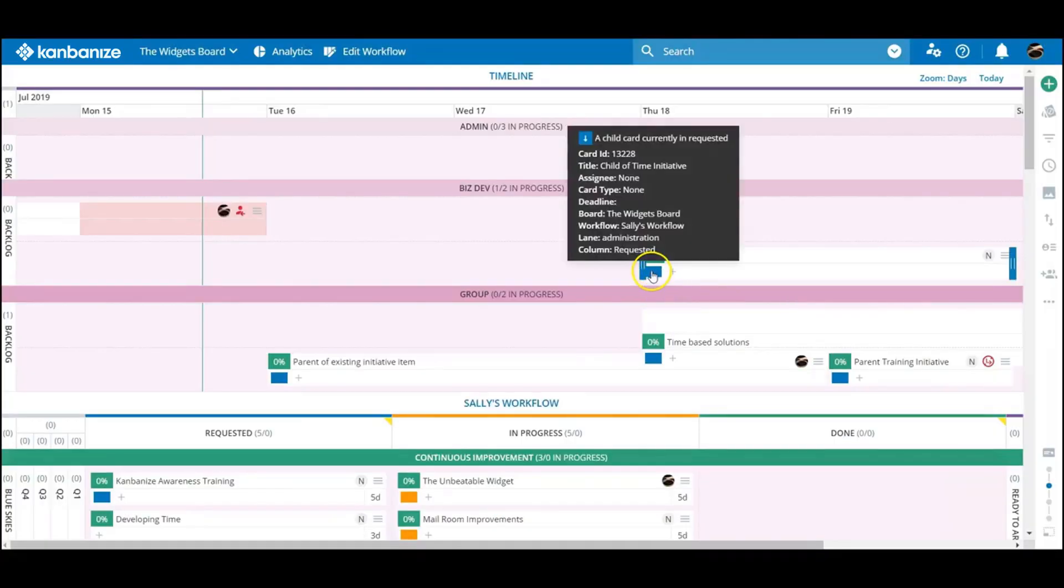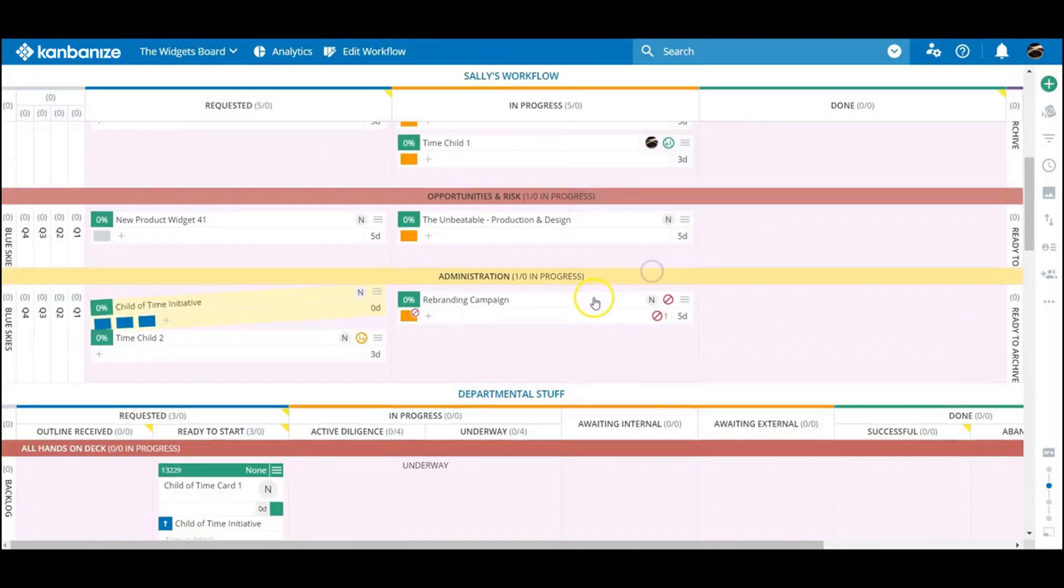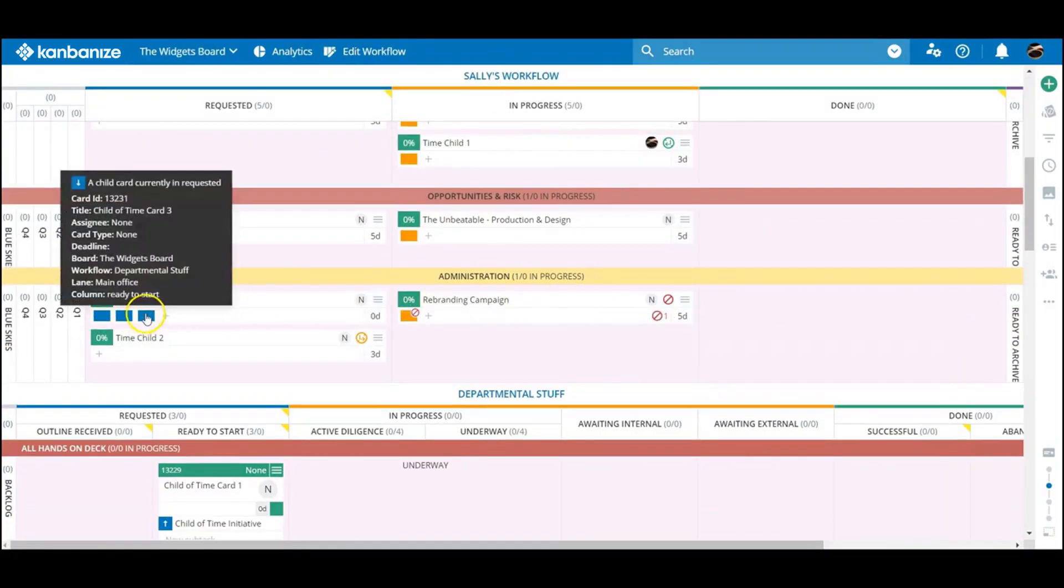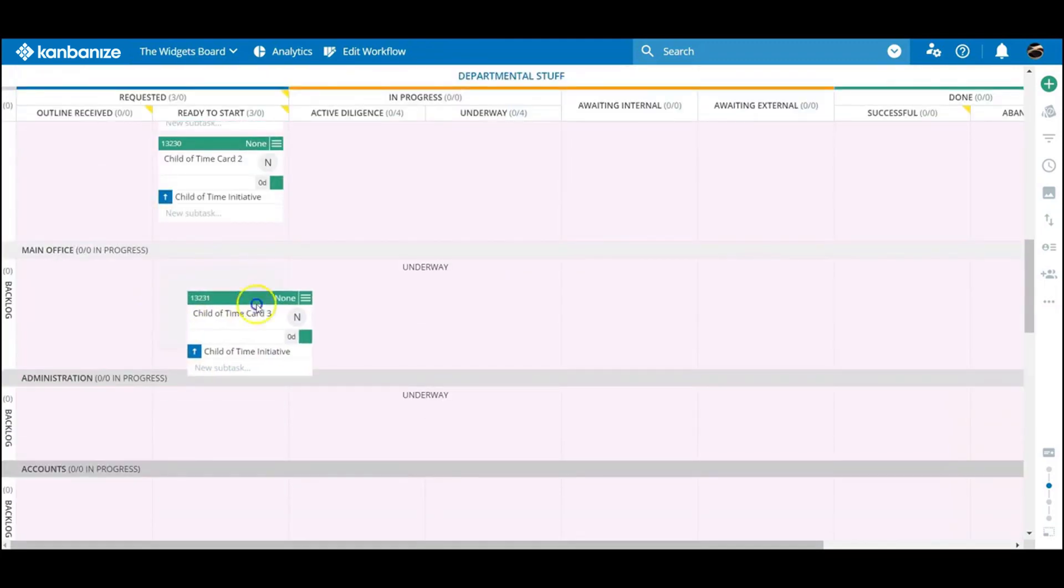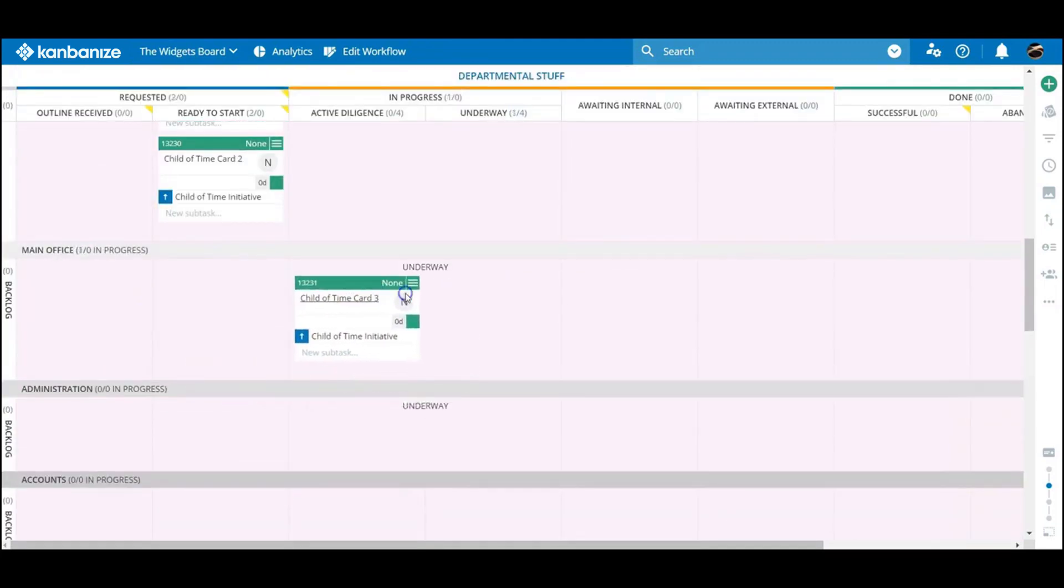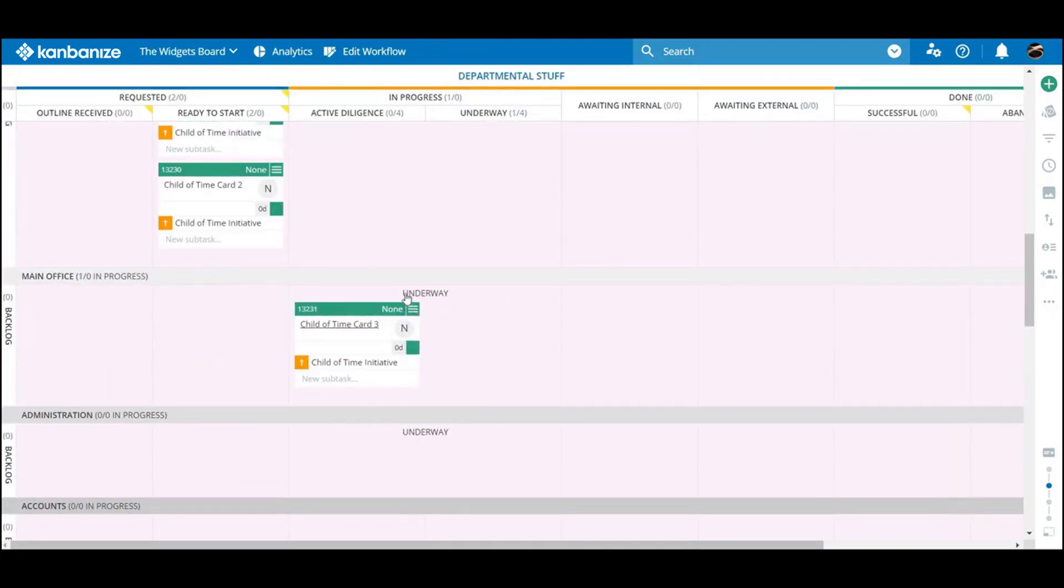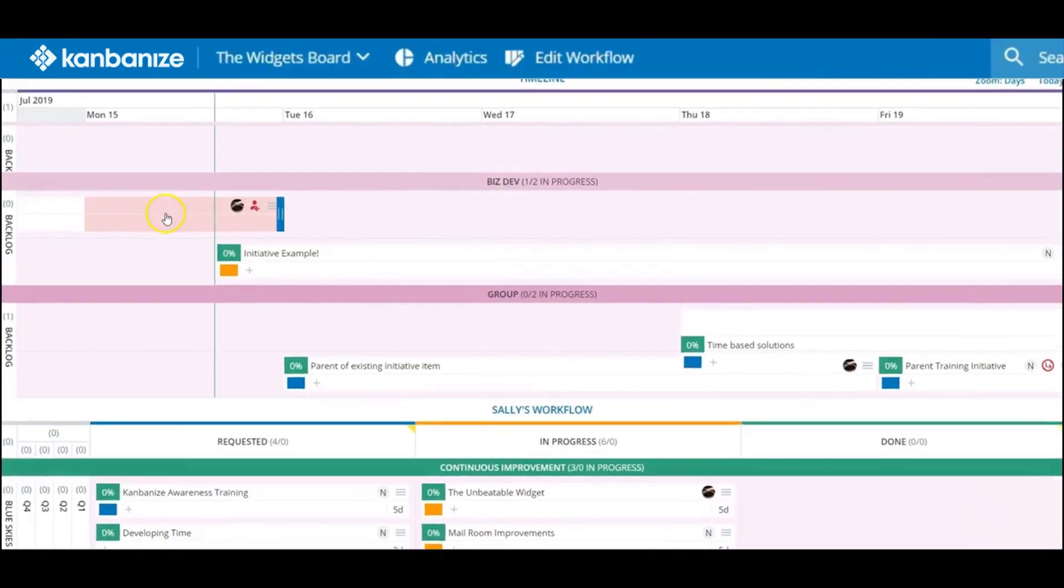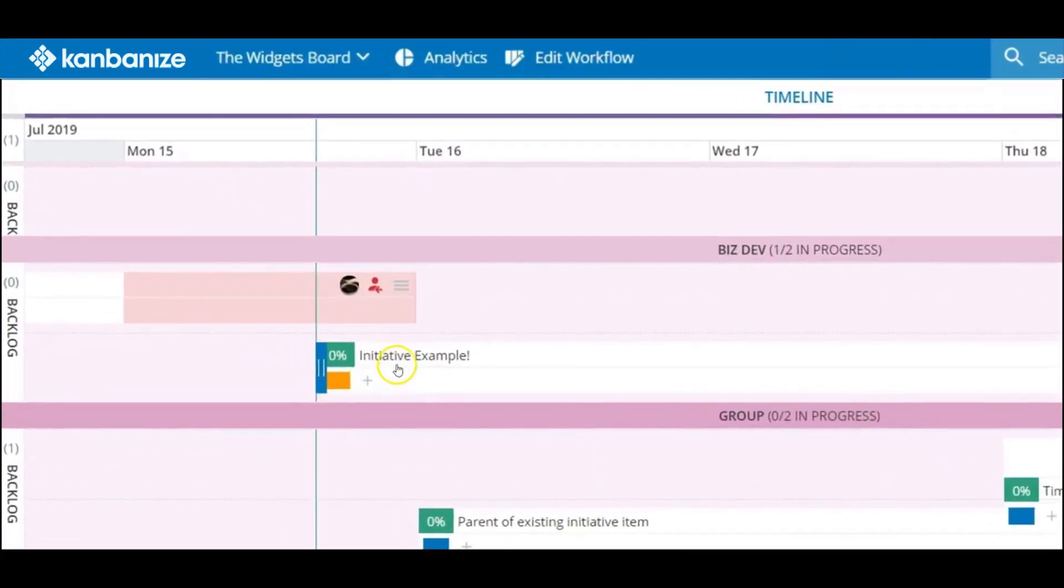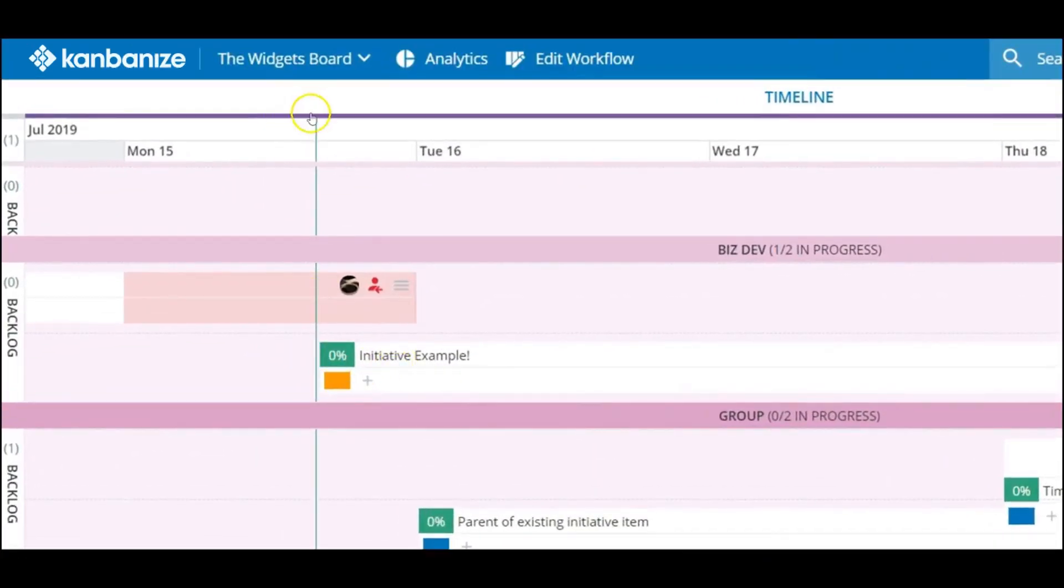Obviously, should a team free up some capacity and they start earlier than the estimated commencement date, this is fine. The start date self-adjusts as soon as the first card goes into progress.